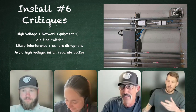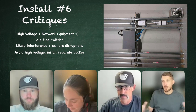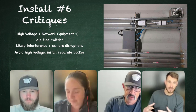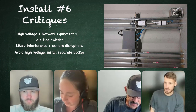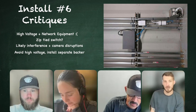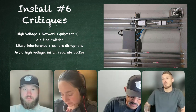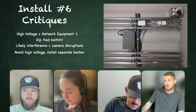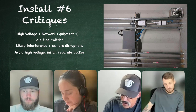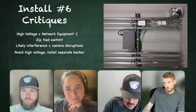Well, that's changing though, because the reason it happens and the reason people get away with it is because when buildings are being built, the electrical inspection sometimes is done before our trade even gets in there. So the electrical inspector doesn't even see the camera or data work sometimes, and it gets by. But obviously that's changing more and more as the general contractors are taking into account our trade when they're designing and building the buildings. For new construction, absolutely. But anything you add to a building or retrofit, unless there is an inspection, it usually makes it through.